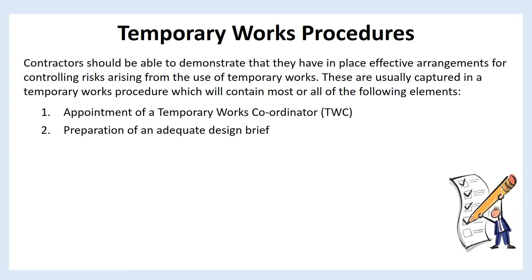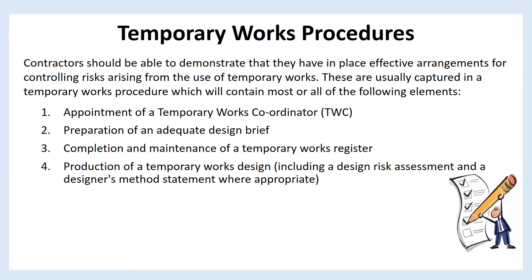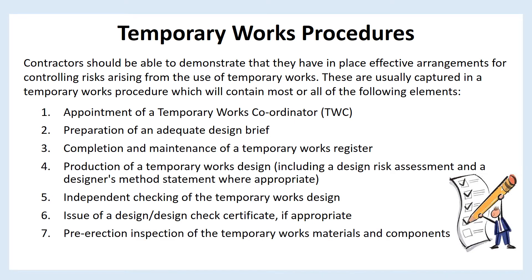2. Preparation of an adequate design brief. 3. Completion and maintenance of a temporary works register. 4. Production of a temporary works design, including a design risk assessment and a designer's method statement where appropriate. 5. Independent checking of the temporary works design. 6. Issue of a design check certificate, if appropriate. 7. Pre-erection inspection of the temporary works materials and components.